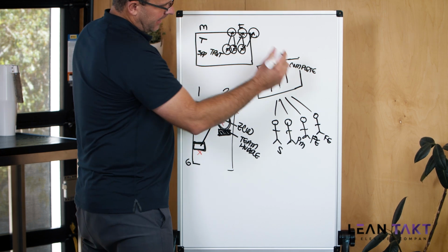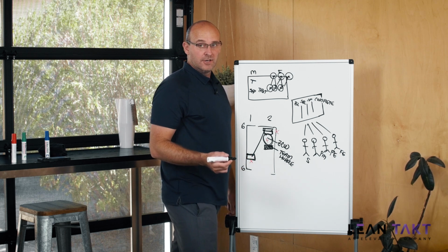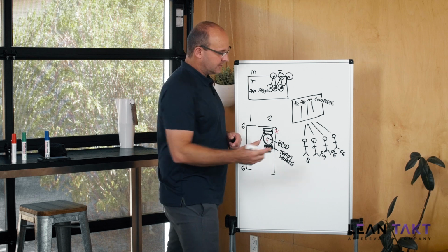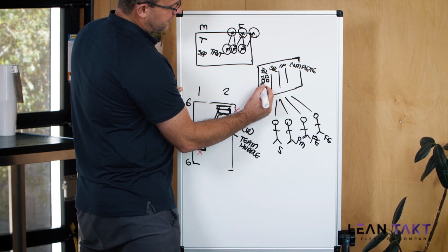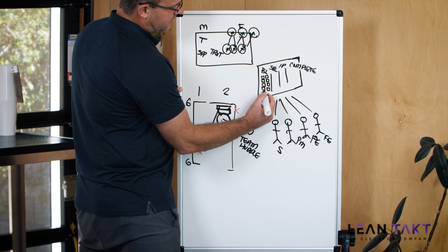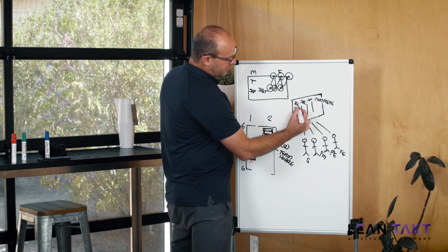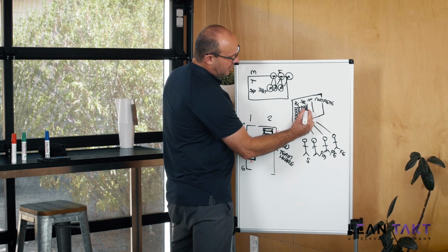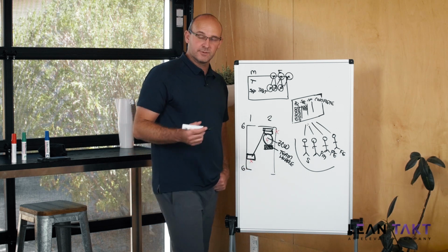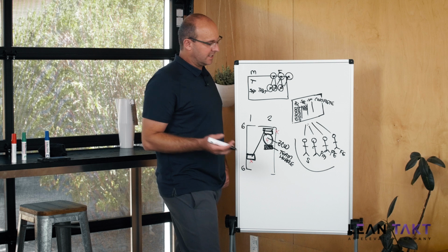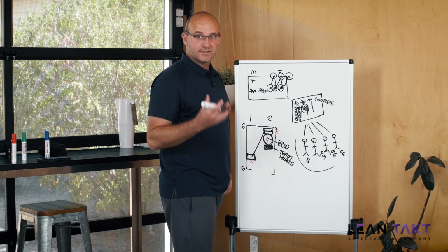Now here's the key. In the Scrum system, you do have a sprint planning meeting. You have daily huddles. You have a sprint review and a sprint retrospective. A sprint is the amount of time that you're going to use to accomplish the activity. So your backlog is going to be filled with little stickies that show tasks to be done that are graded by level of effort and are described well enough to where you know what done looks like, the definition of done. So every week you're going to bring a certain amount of those stickies into what's called your sprint backlog, and this team is going to focus on those. These items could be things like RFIs, submittal approvals, submittal reviews, solving an issue, coordination with the city, whatever the case may be. So every week in your sprint, you're going to have a certain amount of those that you as a team know you're going to do that are assigned to each person.